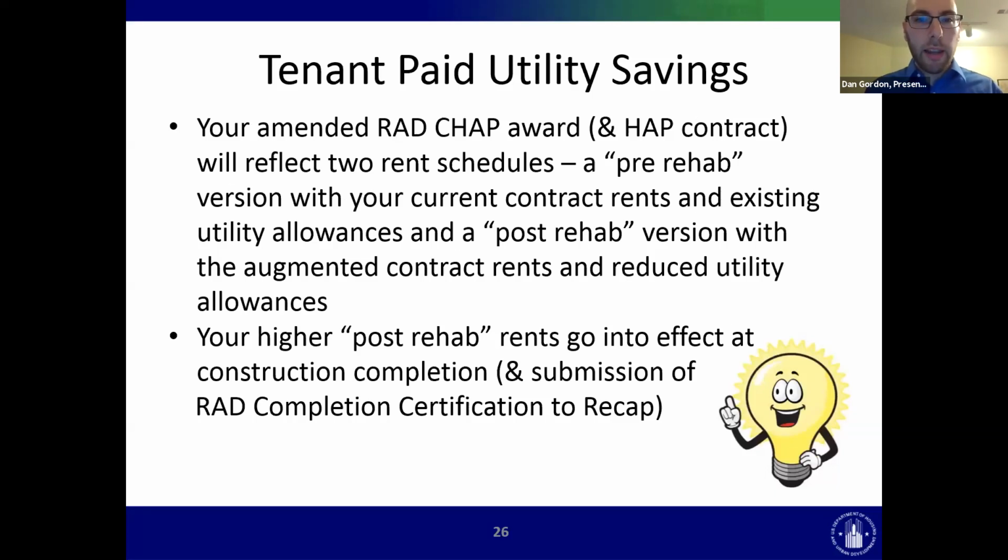What that looks like is that your amended CHAP award and eventually your HAP contract will have two different rent schedules, a pre-rehab and a post-rehab version that includes the augmented contract rents. The higher post-rehab rents will go into effect at construction completion, which is also when we will be looking for your RAD completion certification that you'll need to submit to us.